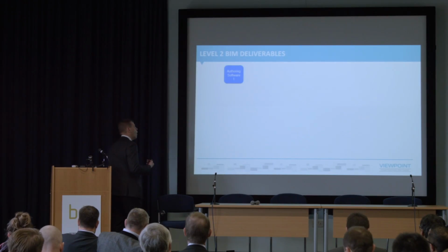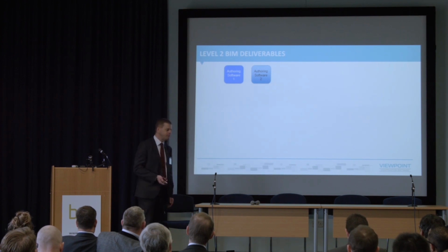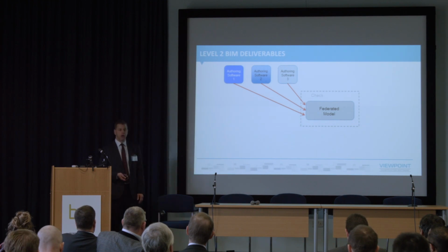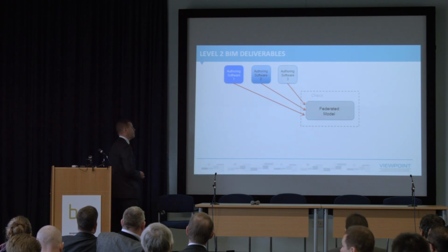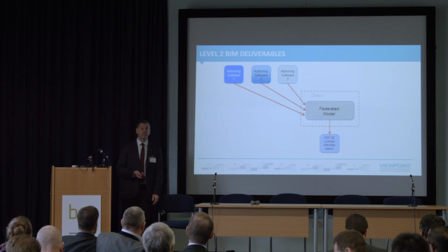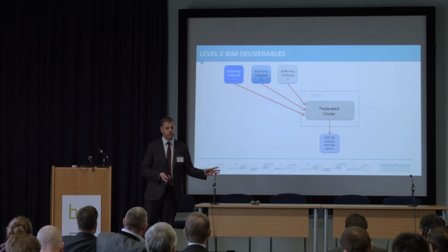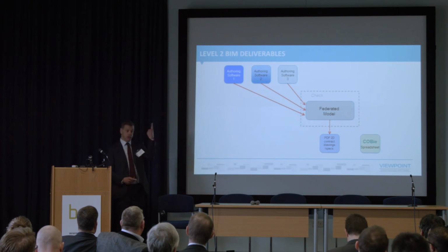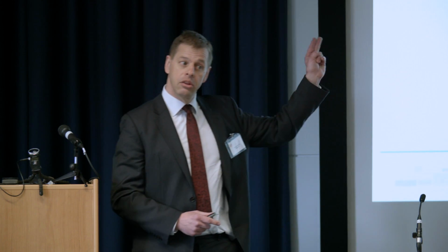So, we author in our BIM originating softwares, whatever they may be, we check our work and we federate those models. We coordinate, we clash detect, and then we federate. And from the federated model, we still produce a set of 2D contract documentation, now in the form of PDFs. So we've got documentation, so your CDE needs to be able to deal with documentation.